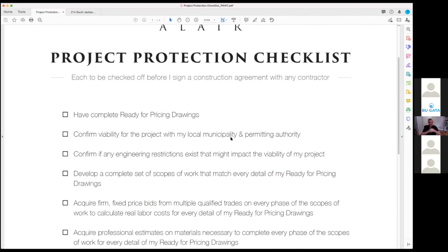Once you're good on the zoning side, and once you determine that you have enough room to do whatever you want to do, that's when you can go in there and start to put some ideas together. Now, you want to get an idea of where you're at with budget. There's some long recordings on my YouTube page and other areas where we have conversations with architects, and we run into it all the time, where most architects will be honest with you and tell you that they don't know what things cost. They hope they know what things are going to cost, but they don't know for sure. So it's a good idea to have conversations early on with the contractor that is building and remodeling in the area where you live, so you can get a good feel as you engage with that architect or designer to start drawings.